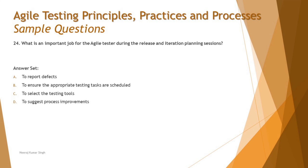Option C says 'to select the testing tools' — that happens after planning, once you have the planned scope of work. You can determine the scope of tool usage (e.g., how much automation is needed), but the actual selection happens after the planning phase. So you decide on using tools during planning, but not actually selecting them. Option D says 'to suggest process improvements' — that's the end goal, happening after the process.